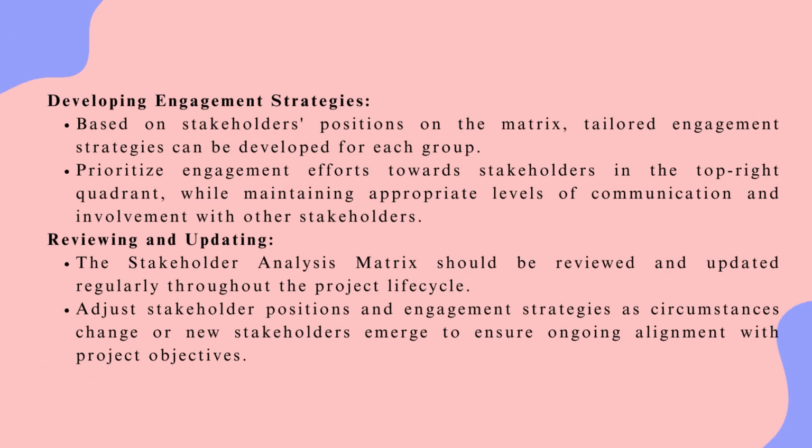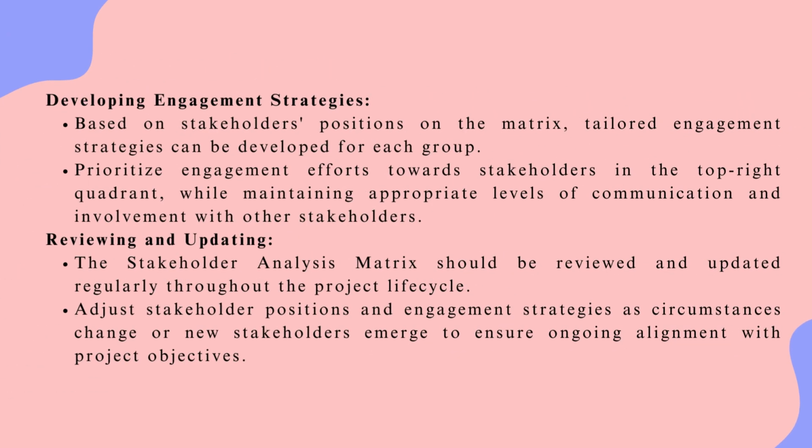The fifth is developing engagement strategies. Based on stakeholders' positions on the matrix, tailored engagement strategies can be developed for each group. Prioritize engagement efforts towards stakeholders in the top right quadrant, while maintaining appropriate levels of communication and involvement with other stakeholders.